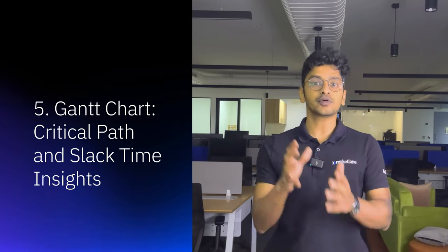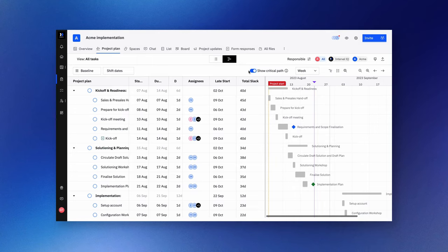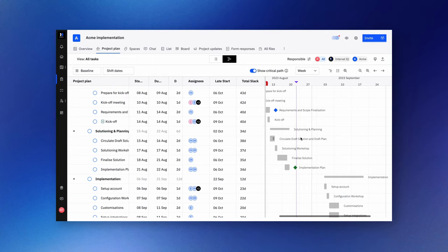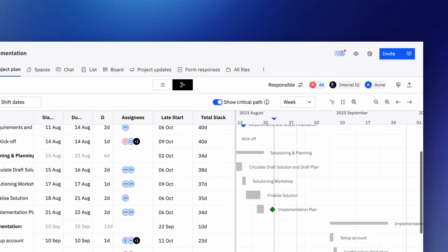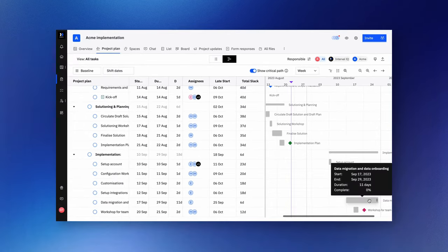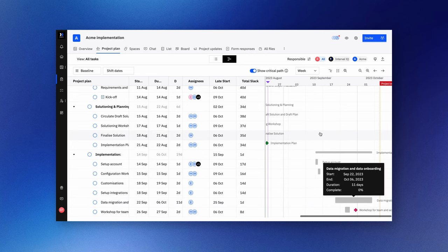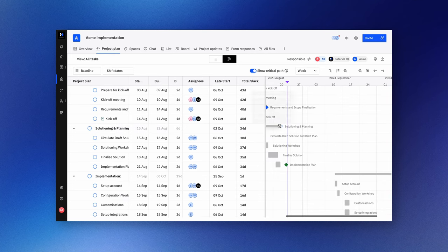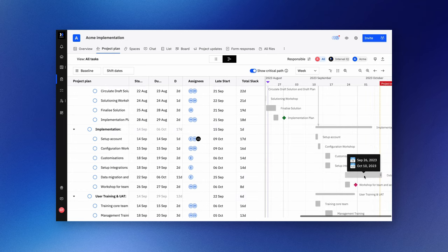Apart from inline editing, Rocketlane's Gantt charts are also equipped with critical path and slack time insights. You can now identify task flexibility and potential delays with more clarity. Enabling the critical path view reveals late start and slack time information. Late start indicates the latest start date without impacting the project's end or due date. Slack time, on the other hand, quantifies the days available before a project due date is affected. This helps you leverage data to reschedule tasks while ensuring project deadlines remain intact.